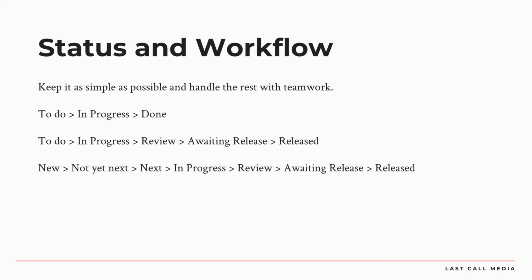So you can get them into your backlog, so it's not yet next, it's grooming, and as the stuff gets broken down and clarified, then it can be put into, here's what's next. So as the team finishes one thing they're doing, and they're looking for the next thing to do, they go to the next column, and they pull an issue to themselves.